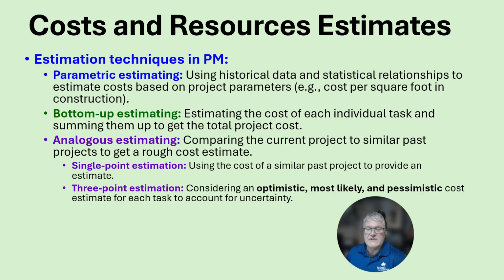So, costs and resource estimates used in project management. Several estimation techniques are used in project management. There is parametric estimating, using historical data and statistical relationships to estimate costs based on project parameters such as cost per square foot. There is bottom-up estimating. Bottom-up estimating is estimating the cost of each individual task and summing them up to get a total project cost. It's often one of the easiest ways to do it.